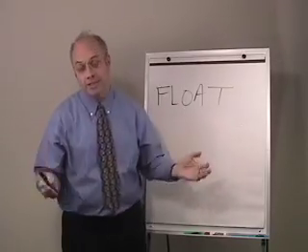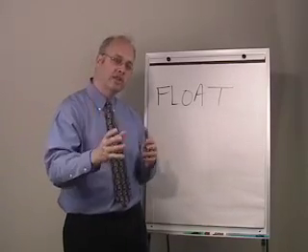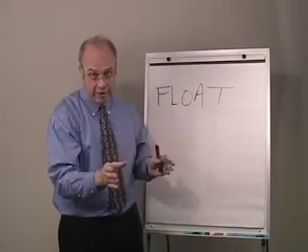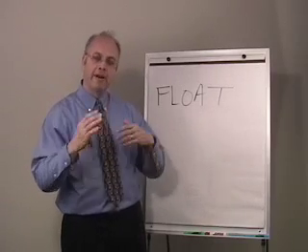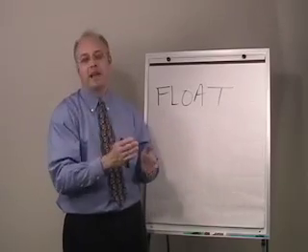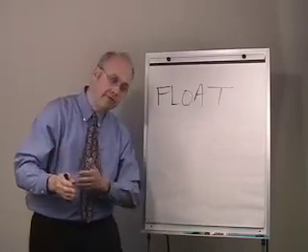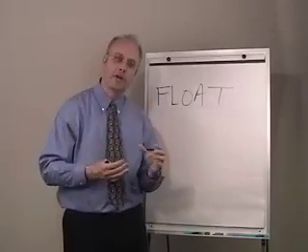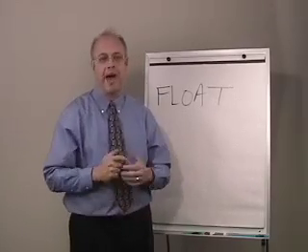In fact, the situation could occur that as I take time away from the project, essentially I take so much float away from other paths of work that they themselves become critical, meaning they have no float. And if I don't also accelerate those activities, at that point I probably can't accelerate the project further. In other words, in order to make further accelerations, further savings in time, I have to accelerate not only the original critical path, but all the work that's now on our new collapsed critical path.